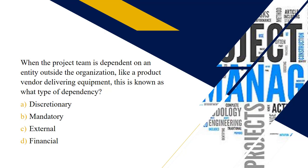Next question: when the project team is dependent on an entity outside of their organization, like a product vendor delivering equipment, this is known as what type of dependency? The choice you should have made is choice C — external. An external dependency is where an entity or condition outside of the project drives the overall scheduling for a specific task.